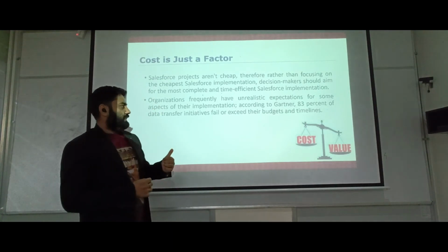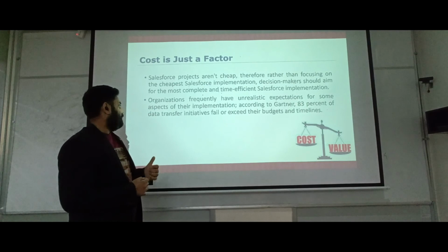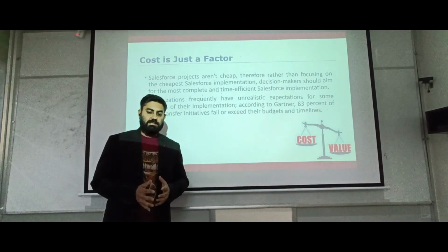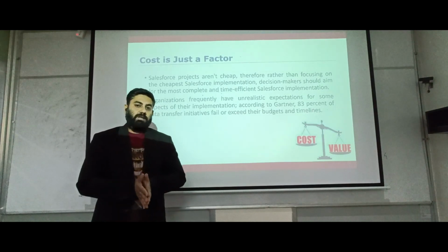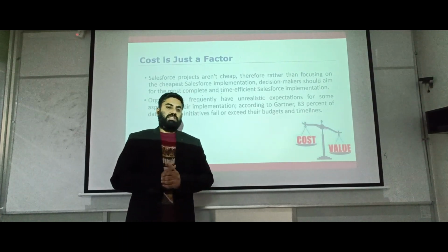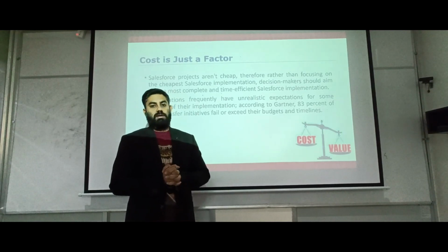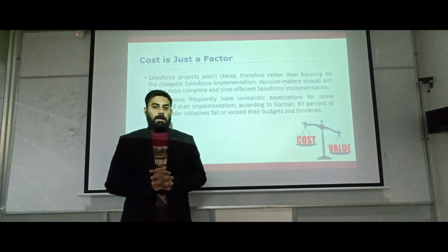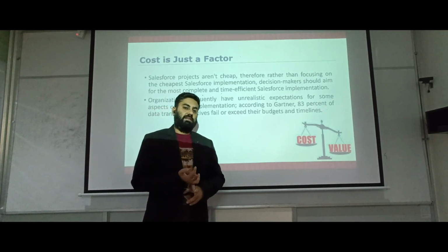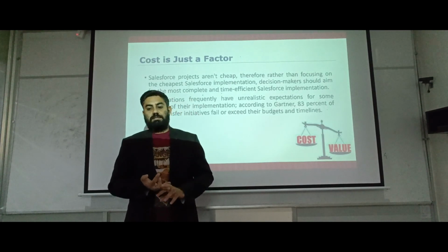Now, I have this number: according to Gartner, 83% of data transformation initiatives fail or exceed their budgets and timelines. This is because of scope creep, and because they don't understand what you're trying to achieve. So this kind of discussion needs to be done before the project. I hope now you can find your partners by simply looking at their website or the App Exchange listing.